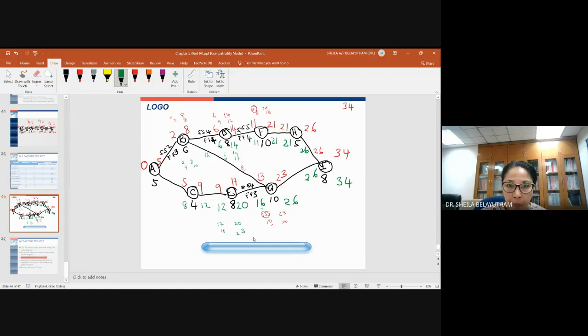Okay, so the comparison that you need to see is the same comparison. So we look at the finish. Okay, so either you're comparing 16, 14, or 8. Okay, so 8 is the smallest, hence we will select this 8, 2. Okay, so from here, the contributing from C will be 8. So from SS2 here, okay, so it will be 2 minus 2, you will start 0. Okay, so 2 minus 2, 0, plus 5, you will finish 5.